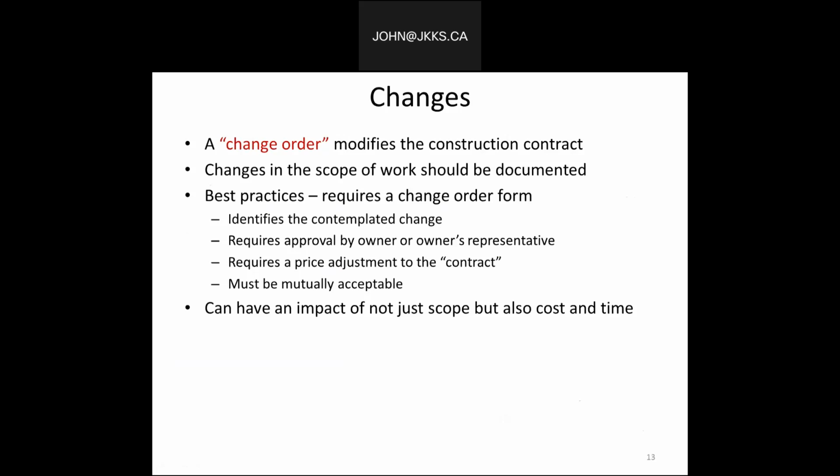It should identify the contemplated change. As noted, it requires approval by the owner or the owner's representative, such as the architect or engineer. It requires a price adjustment to the contract. Generally, it's an addition, not always, we'll say a deduction, but in some cases it may be. And it must be mutually acceptable. And certainly when we think about it, what is the impact, not just on the scope, but also on the cost and the time?